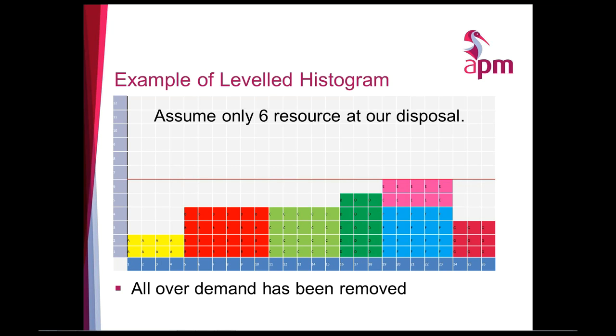So there are subtle differences, and you have to start programming around it by using physical percent complete rather than actual percent complete and stuff like that. But Microsoft Project is great if you're doing a simple project and you want to test your plan and what have you.